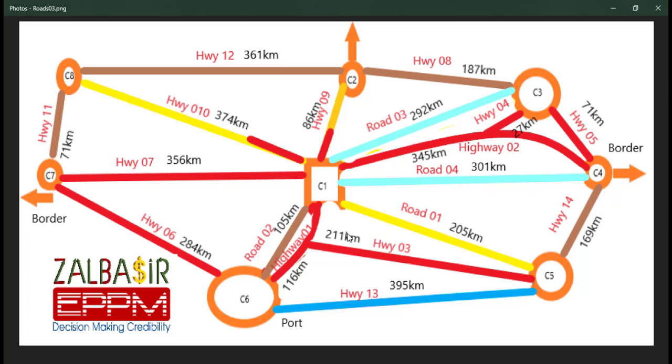So we did all this analysis in the beginning, in a very small, fast brainstorming in one table, using the aerial map, terrains, the populations, and the economic data we know about the cities, the requirements and the existing road conditions. Some clients, sorry to say, will not have experience in-house, and give this small exercise to a consultant that costs them $100,000 or $200,000 to do this initial planning for interstate highways. At this scale, it might cost them at least $500,000 to engage a consultant if they don't have the experience in-house, just to do this initial planning, and then give this initial planning and scenarios to the consultant ready to evaluate and build on top of it.